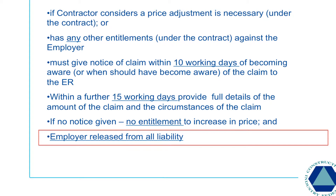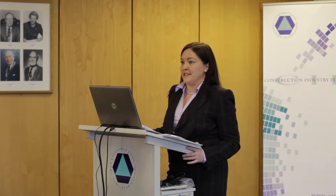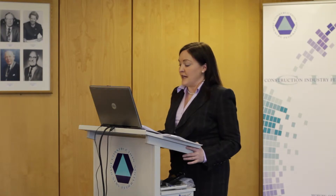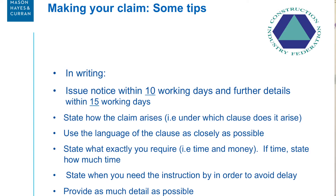If the contractor does not give the notice and details according to and within the time required by this clause, the contractor is not entitled to an increase in the price and the employer is released from all liability to the contractor in relation to this matter. If you hear nothing else today, hear that - the employer is released from all liability. You must get your claim in within 10 days of becoming aware of it or when you should have become aware of it.